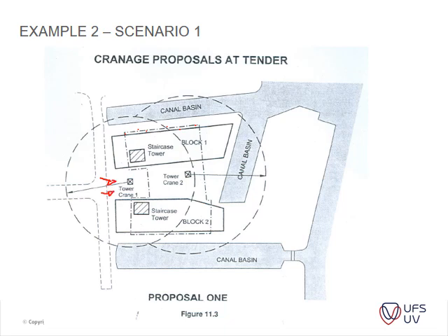You can see the access is limited to this crane here, because it doesn't necessarily reach everywhere. So that's one of the considerations that you need to take into account, is access to site and to where the crane can actually go. Okay, so just go read through it. I think it's fairly straightforward.